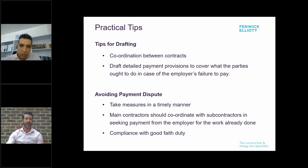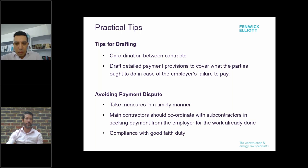From an English law perspective, including a pay-when-paid clause makes little sense if it will simply be deemed ineffective. Some international contracts, such as FIDIC contracts, do include pay-when-paid provisions — so if you're using a FIDIC contract in England you will need to make adjustments to your subcontract to reflect the position in law. Even in a civil law jurisdiction, I question whether imposing a strict pay-when-paid clause — one that gives the contractor an unfettered or unlimited right to withhold payment — is in everyone's best interest. The inclusion of such a clause can create distrust between contractors and the supply chain from the outset of the project.